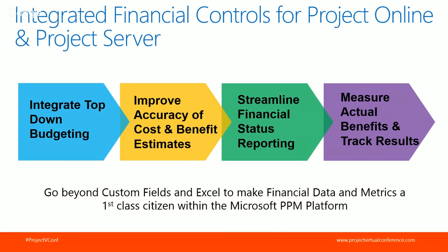So bringing together and reconciling information from the ERP system automatically, providing an interface for the PM to easily report on actual costs, remaining costs, and have that recorded alongside other metadata that is important for the project status report. So think about how do you automate that financial status reporting and, let's say, monthly closeouts on a periodic basis.